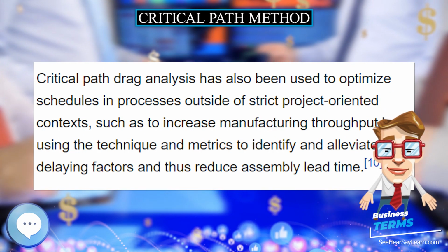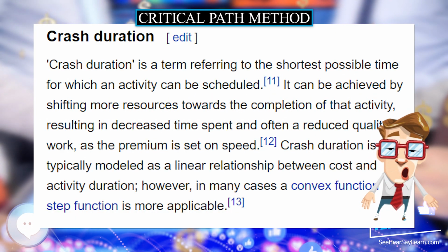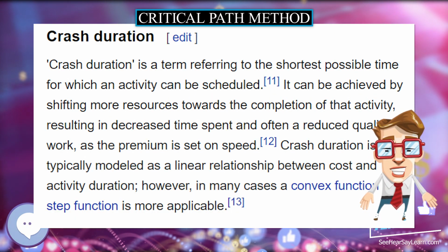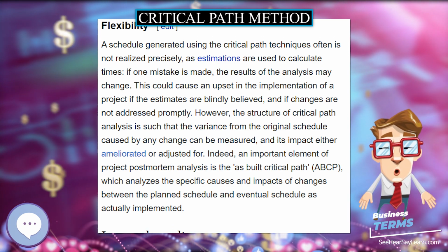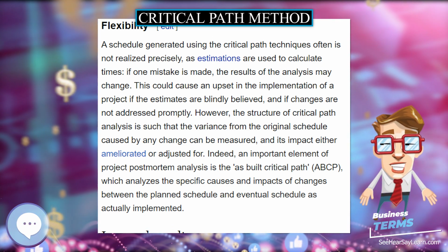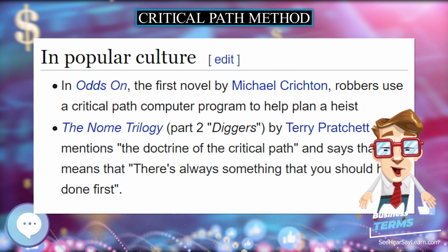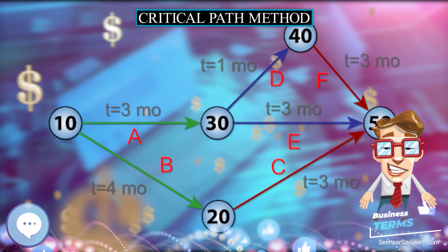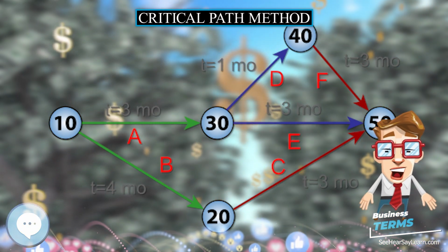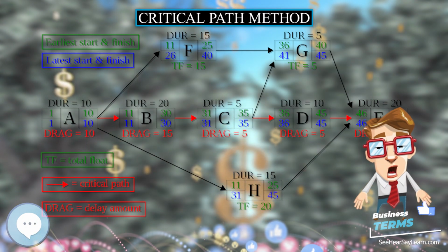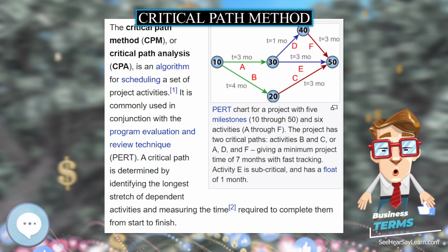A related concept is called the critical chain, which attempts to protect activity and project durations from unforeseen delays due to resource constraints. Since project schedules change on a regular basis, CPM allows continuous monitoring of the schedule, which allows the project manager to track the critical activities, and alerts the project manager to the possibility that non-critical activities may be delayed beyond their total float, thus creating a new critical path and delaying project completion.